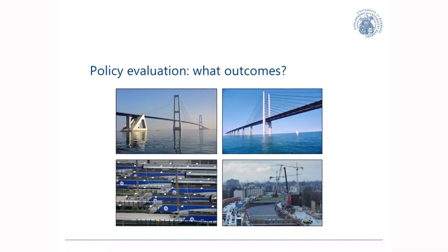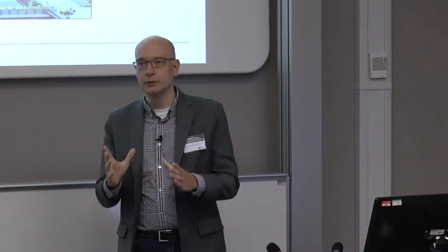So where does it start? It starts with mega projects. Mega projects, for those who are familiar, are projects that cost a billion or more — there's a very loose definition. But you know the ones: very expensive, prestigious, and above all, way too expensive. Budget overruns, time delays — delivered five or ten years after the actual deadline. These were documented in the book by Bent Flyvbjerg, who wrote in 2002 on mega projects and was probably the first to launch that term.